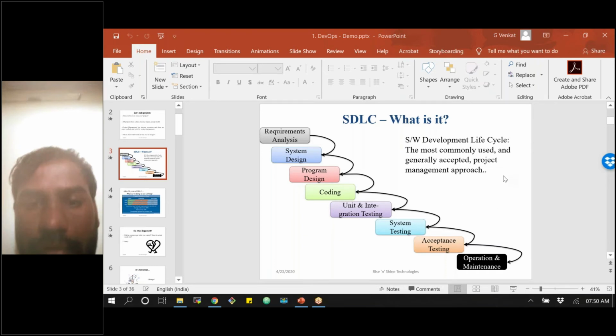For all the remaining phases, the team is going to take care of that. So initially the client is involved here, then he comes to the picture before release to production. This is one disadvantage: the client is not a member in the process. Another disadvantage is that there is a lot of dependency between the teams. Each team member handles his scope only.